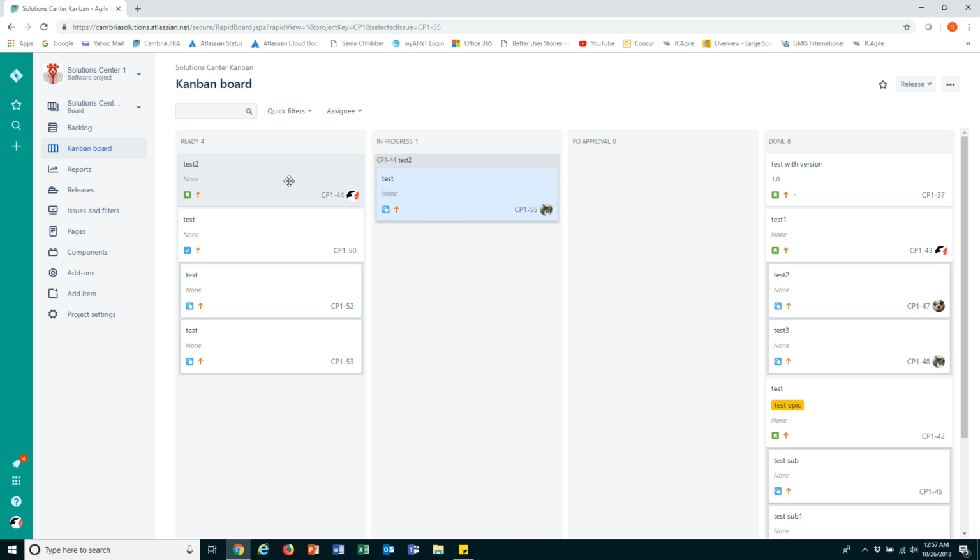All right. I want to talk about the parent story. There's a change that we made there as well. And that is, I put a condition into the workflow that says the parent story cannot be closed until all the children's stories are closed. So I've already taken one of my subtasks and I've moved it to done. But I'm going to try to do the same thing with the parent story, and let's see what happens.